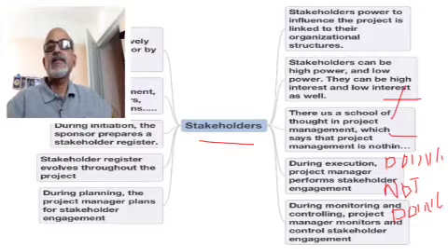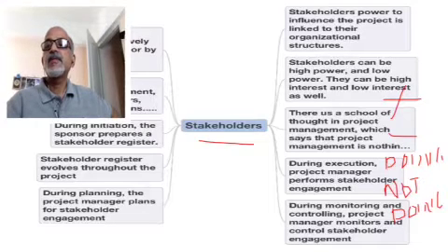So it is a dynamic document, the stakeholder register, which happens during initiation. The first cut of the stakeholder register is prepared by the sponsor, because the sponsor is the person who is creating the project charter.